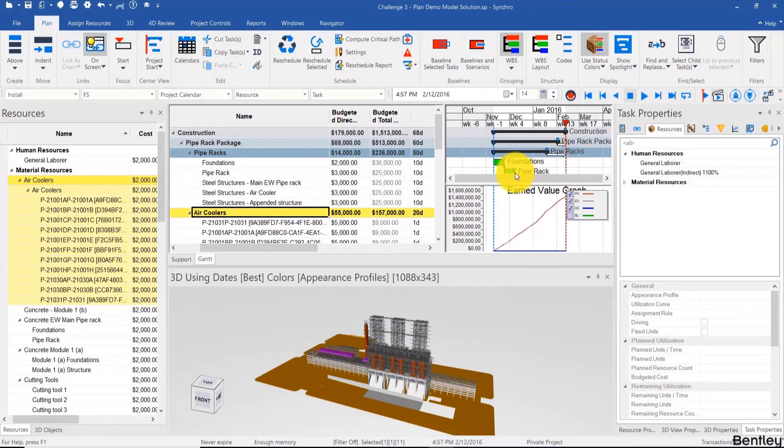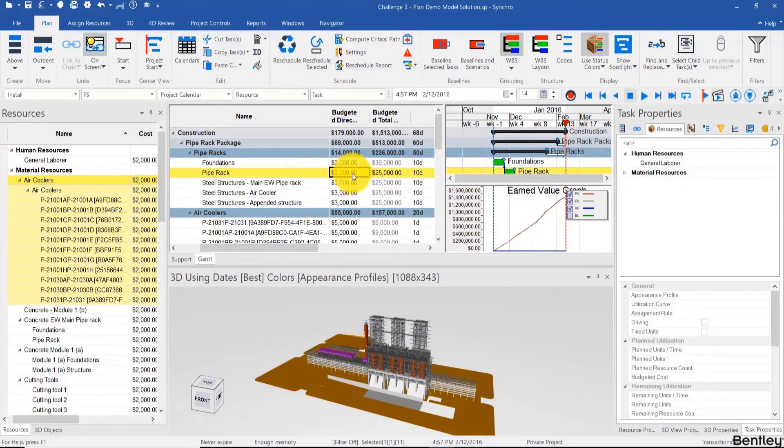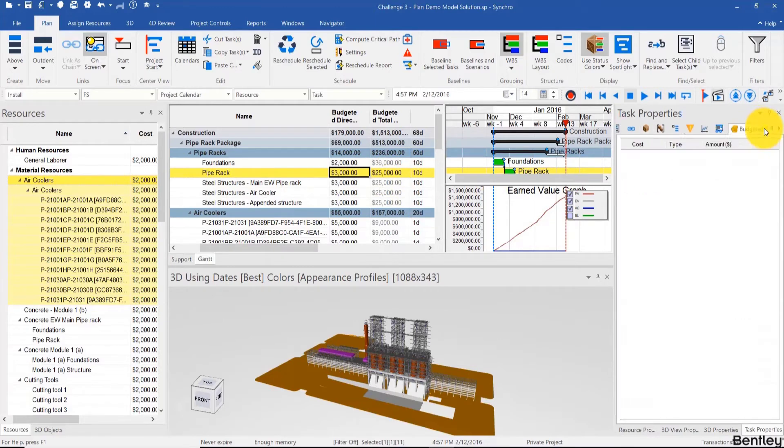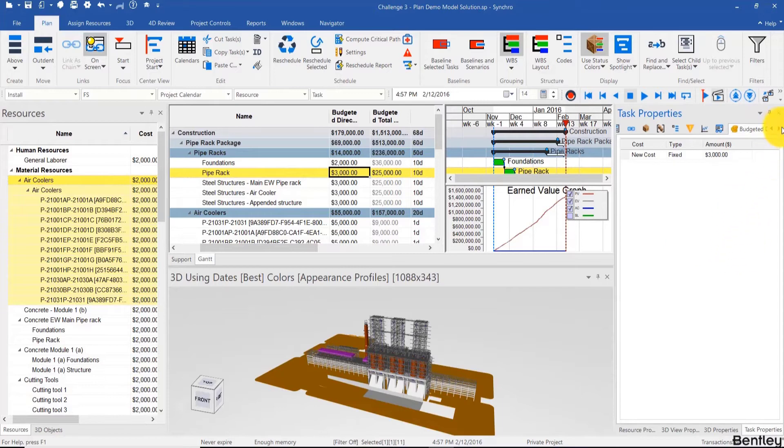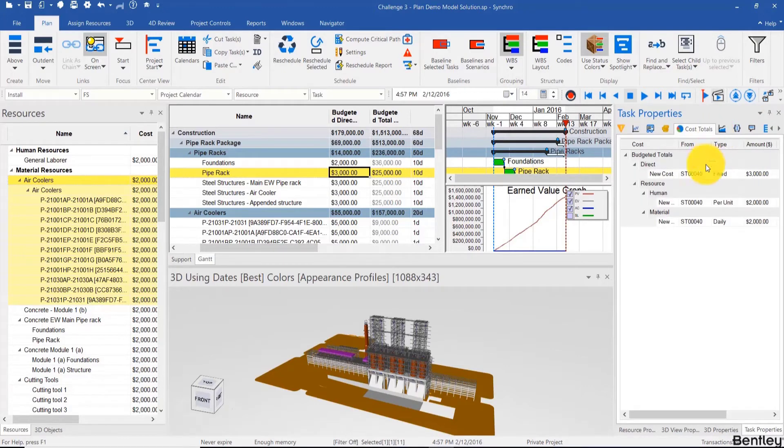Now to visualize, to drill down in the costs, for example of that task, we see $3,000 here but $25,000 here. We can't really go to task properties costs like we did earlier because this is just for fixed costs. Here we have to go to task properties and cost totals, which is this pie chart over here.